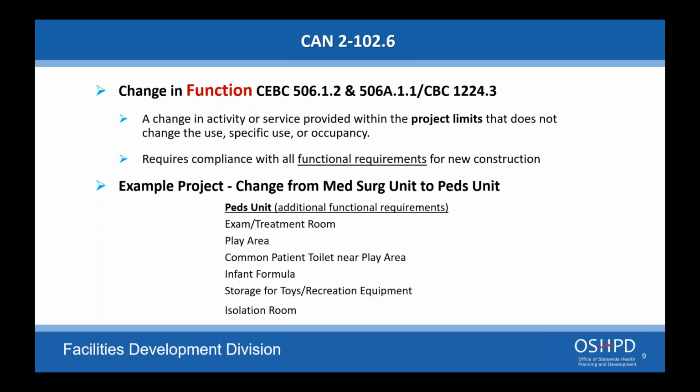If you just happen to see it when you're up there, it would be triggered as a future existing non-compliant condition. It's the owner's call if they want to replace it now or later, but it would need to be repaired because existing non-compliant would trigger a condition being placed on the facility.